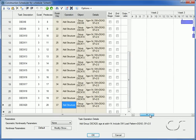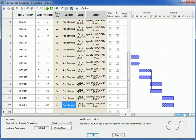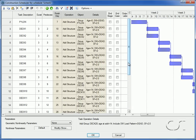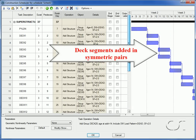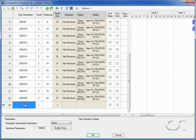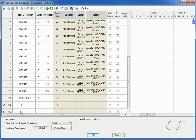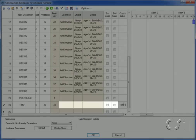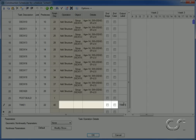Scrolling out we can see how the tasks relate to one another on the Gantt chart. Next we will add tasks after the construction to model the effects of time. We will input a task summary called 'post build', then a task called 'time 1' with a duration of 3 days and a predecessor of task 22 but no operations. This task is only meant to mark the passage of time — no structure is added or loaded. However, we will specify an output label to ensure that we get output for this task since it contains no operations, and the 'end stage' and 'end case' checkboxes are not marked. Continue to add time tasks.